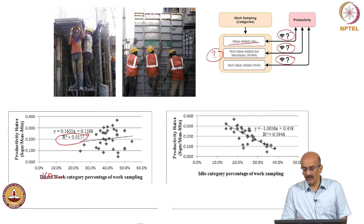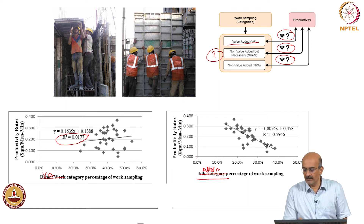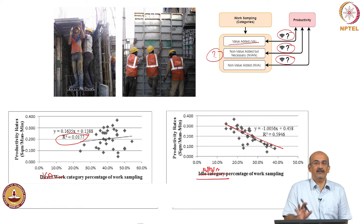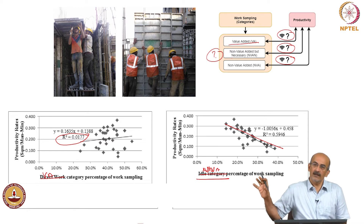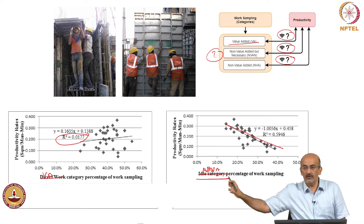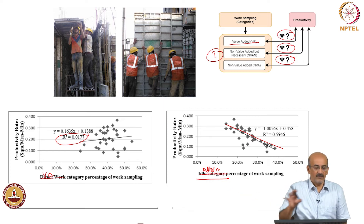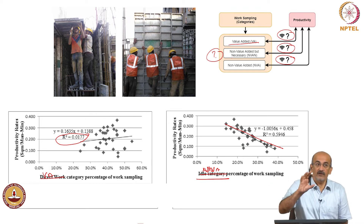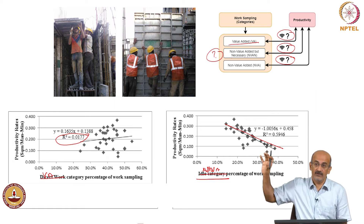But on the other side, when we took idle or non-value added and productivity, we found that the more the idle time, the productivity decreased. So one thing is clear: if I go to a site and find a lot of non-value added activity, then my productivity measurement system is going to show a lower productivity.